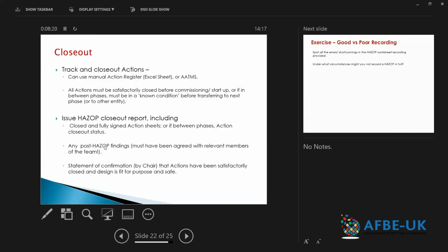There are various kinds. There's PMIS, PIMS, and there's this other one, ATMS. I think in my previous former life, I have used the automated action tracking one, which is the one that you are able to send out automated email reminders for people. So maybe the action closeout date is nearing, so you send out a reminder just by pressing a button. It sends a reminder to the persons. First of all, it sends an automated action notification, and then sends reminders until the actions are closed. They're all closed in that system.